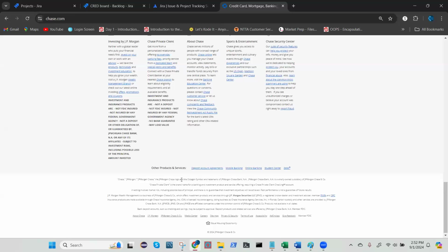What are you going to do with footer links? So what value do these links below have as part of one user story? You also have to think from your perspective, at the back of your mind: if I take these development footer links as one user story, is this user story delivering some value? If you don't think so, then add more to make sure it delivers some value.